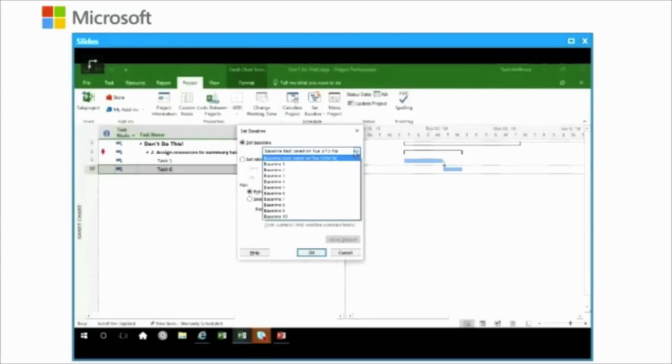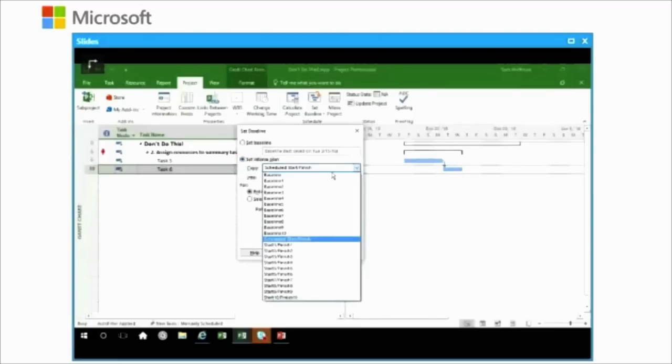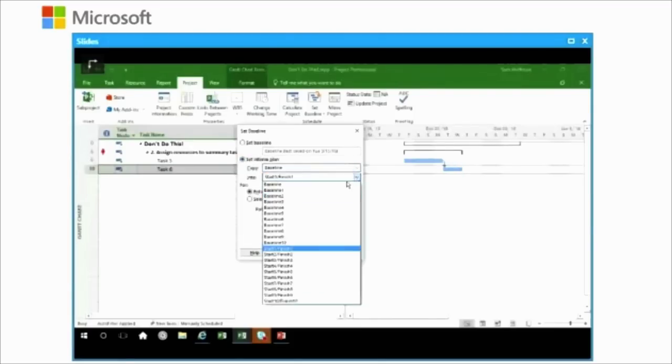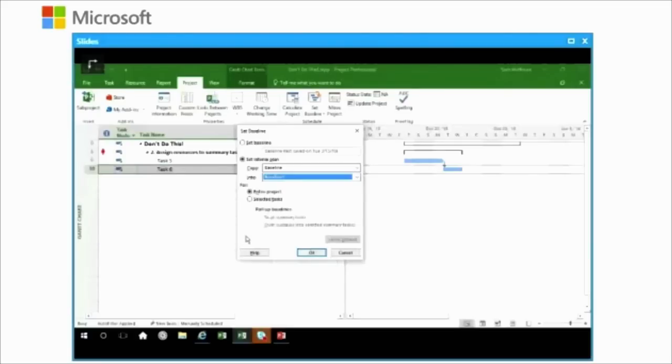If I understand, the requirement here was that we don't have resources on our tasks, so I'm going to take them off. We have resources on our summary task, so I'll put them on the summary. Now, the resource is assigned to other tasks, so that's why we're getting our over-allocation here. If your resources are on your summary tasks, and Project will allow you to do it, you picked up on one requirement if you're going to follow this, and that is that no resources are assigned on any other tasks here.